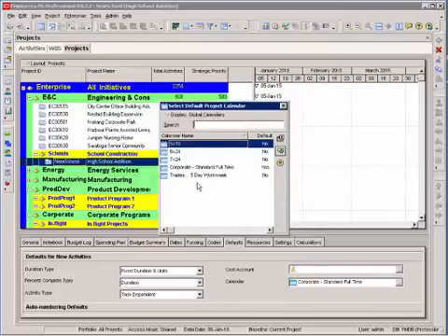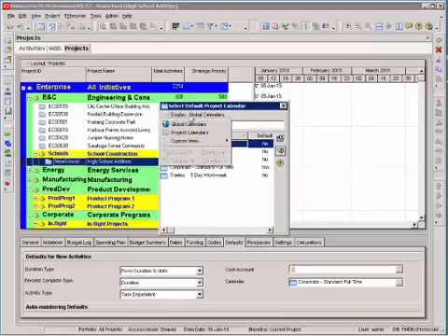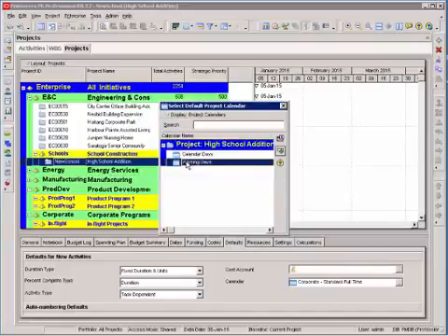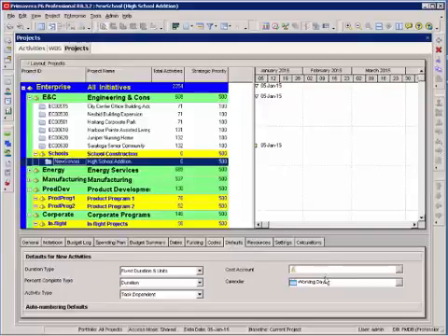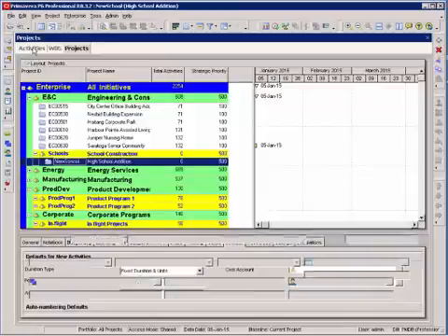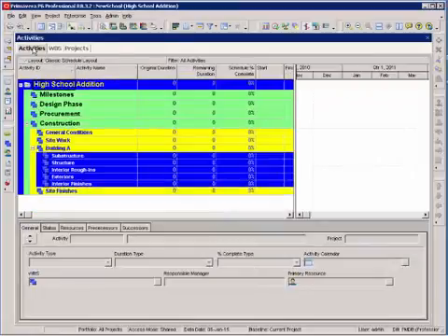If you pull up a window that doesn't have the information that you think should be showing, in nearly all of your P6 windows, there's a pull down at the top where you can select what you want to view. In this case, I want to view my project calendars, and there is my working day calendar. I select it, and it is now my default. So when I add activities to my schedule, they will automatically be assigned by default to the working day calendar. Now I'm ready to start adding activities.